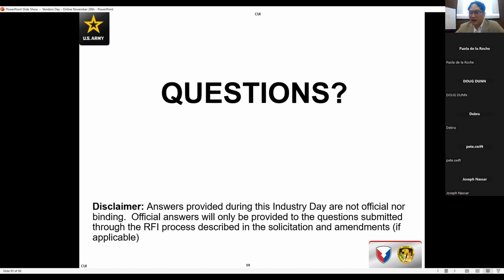The other thing that I can say is that sometimes when we get email traffic back and forth, the person signing off on the proposal, specifically for the MATOC, since it's going to be a request for proposal process, should be somebody who is legally able to bind the contractor. So let's say you might have a VP who can legally bind, but the person who actually signed off on the proposal or is emailing is not the VP.